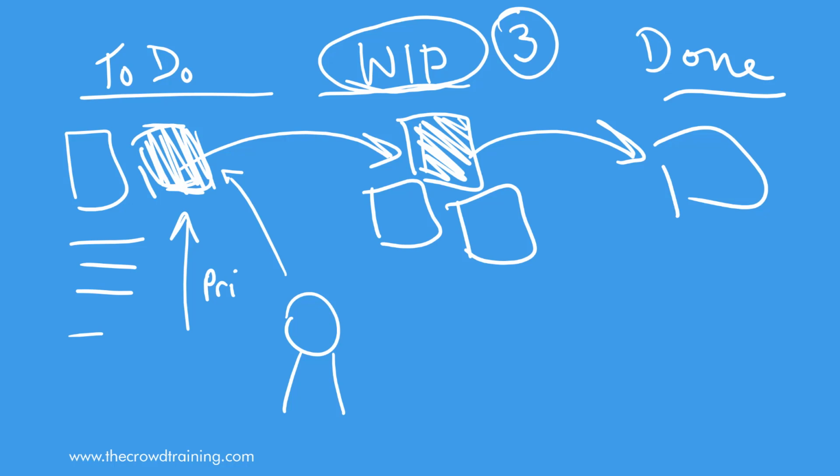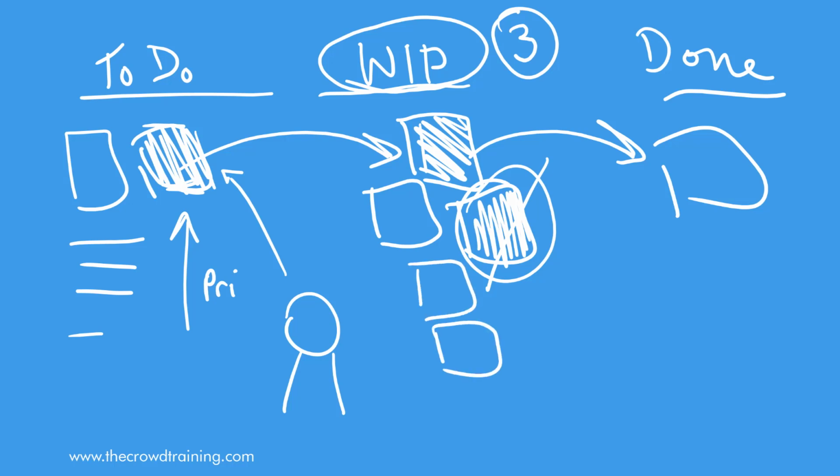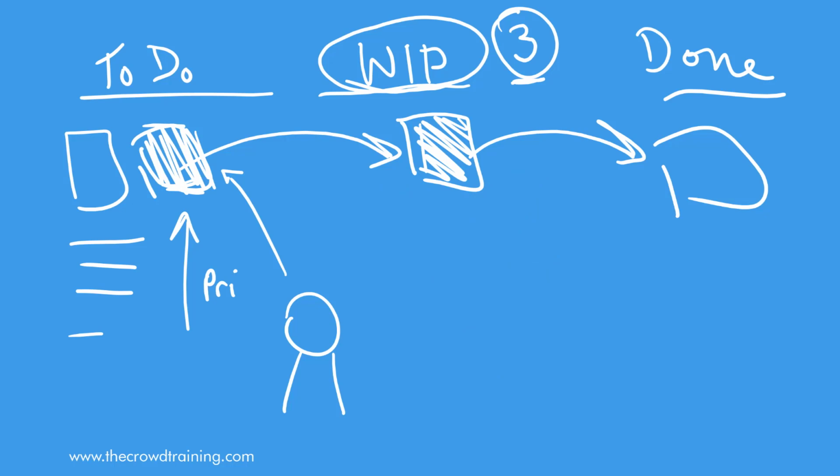Part of that is that, well, if one is blocked for any sort of reason that I can't work on it, well, maybe then I have 2 others that I can work on. But if I try to add too many, again, we're going back to that adage of trying to multitask, and it's only going to do more damage, or it will reduce your output and throughput. We are going to then try to limit this to 3 as a best practice. Ideally, if you can do 1, well, that's even better. And just do that one thing and push it to the next.